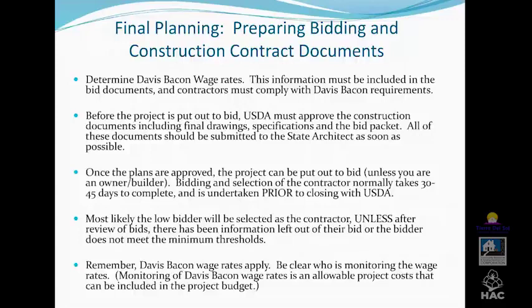The contractor, remember the first time we submitted this was estimates. The second time, this last time around, when we're preparing for the final submittal, the contractor prepares this based on their bid. You insert the soft costs here, and then the contractor and the architect certify this, and this is an actual cost here, and gets submitted as your final packet.